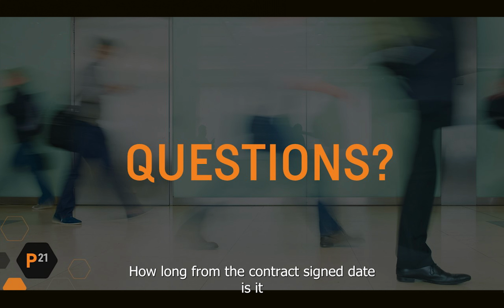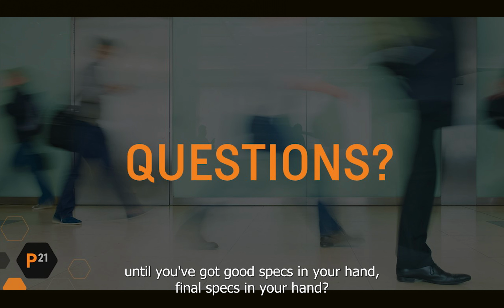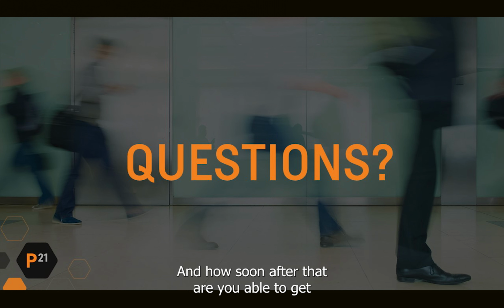So you know how long from the contract sign date is it until you've got good specs in their hand, final specs in their hand, and how soon after that are you able to get some result data coming in, even if they're test transfers.